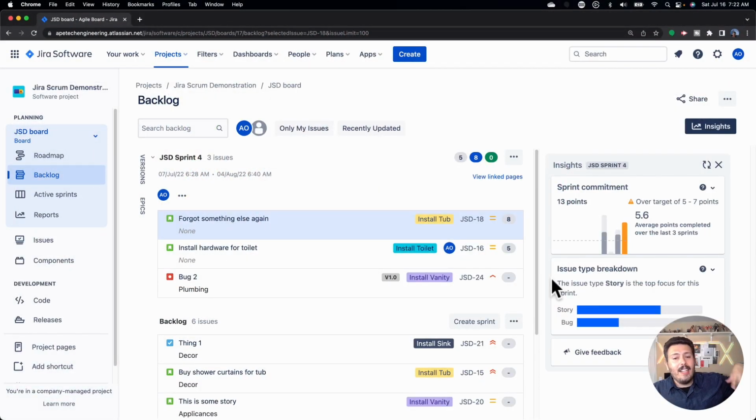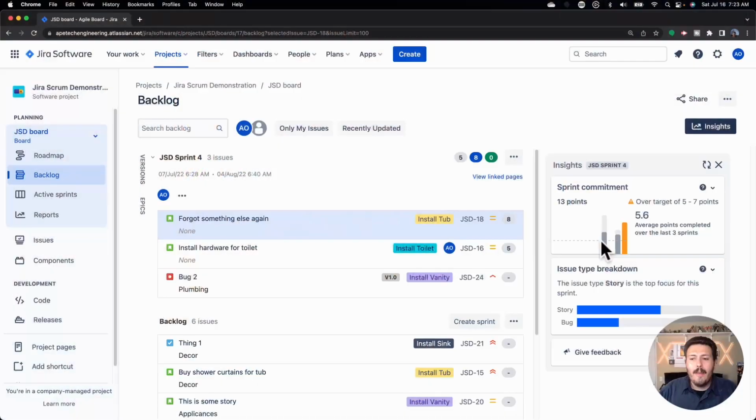Thankfully you don't have to worry about how to calculate it because Jira's doing all the calculations for you. All you need to know is that based on all of that, Jira's calculating some stuff behind the scenes, and it's going to tell you over here. See this little gray dotted line? Based on your team's raw performance from the last few sprints, and based on how many points you're already planning into your sprint right now, this is where we are on what I like to call the Goldilocks scale. This tells you if you're just right, which means the number of points you've allocated so far to the sprint is pretty much on par with your previous team's performance.